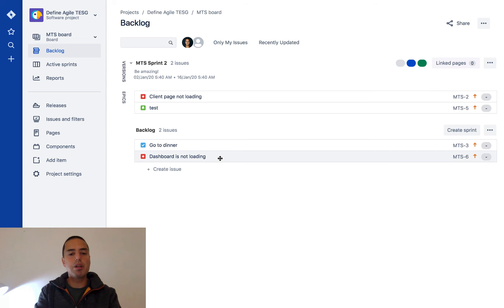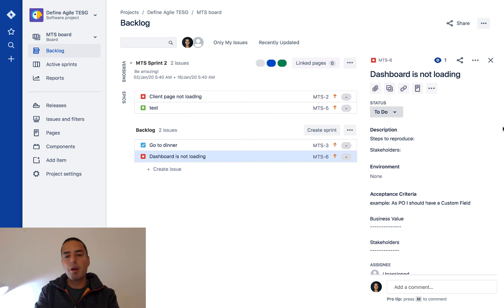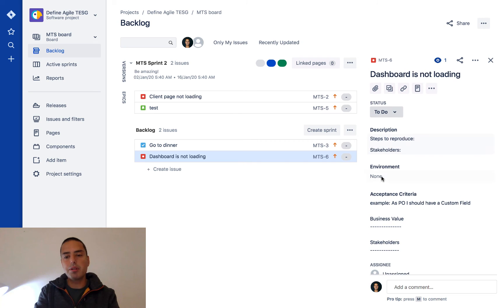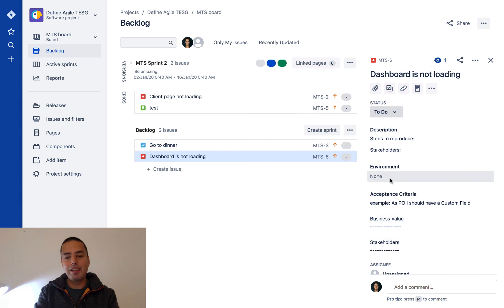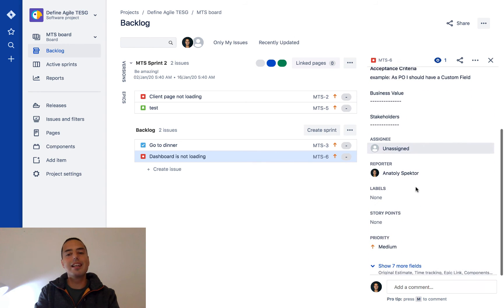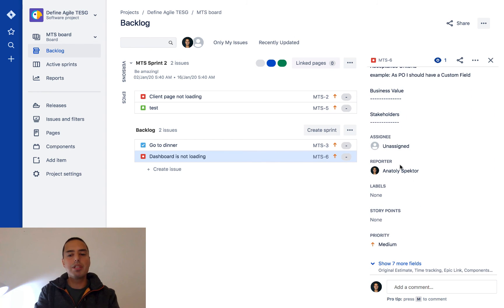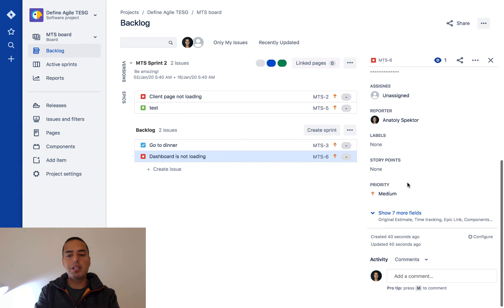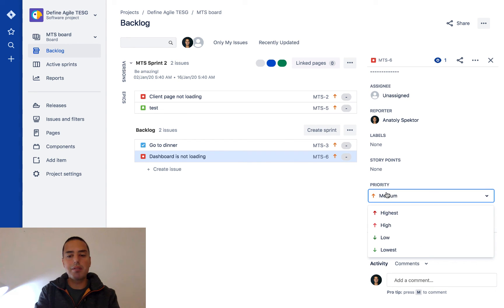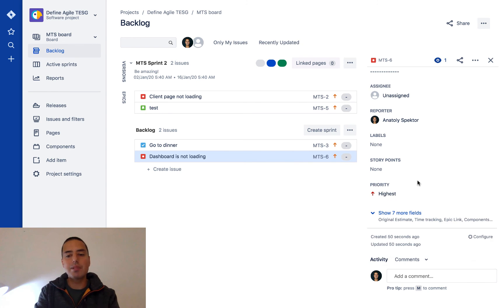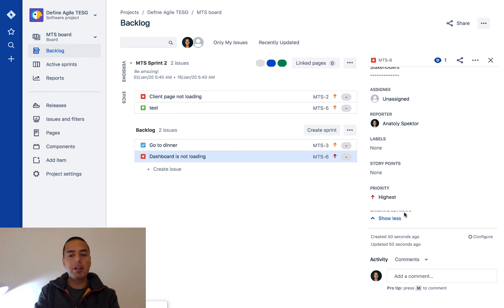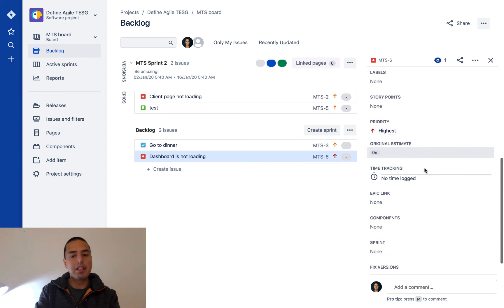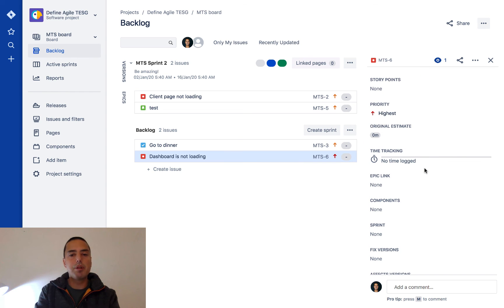If we click on it, we'll see our description is here. We can also select environment - this is my custom field that you probably don't have. We can assign it, see who the reporter was, add labels, story points, change priority of our bug which is important. Let's say it's a crazy important bug - we can put highest priority here. We can add time estimates, log time toward it,